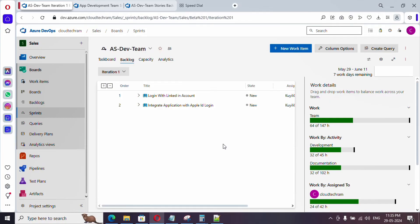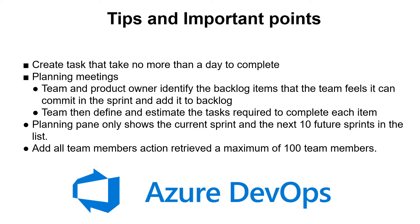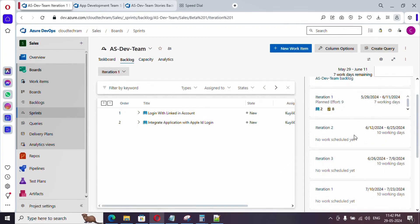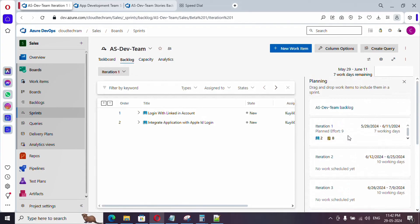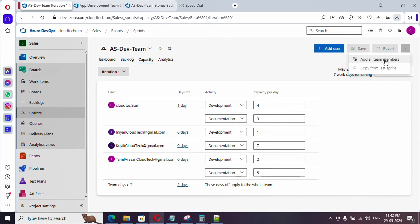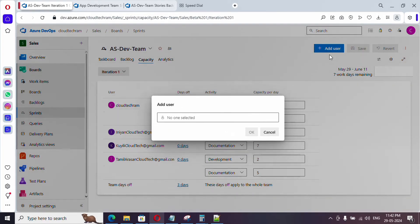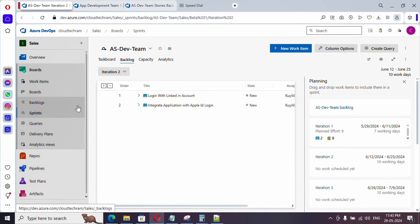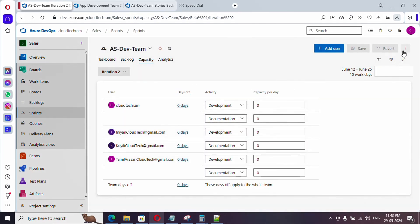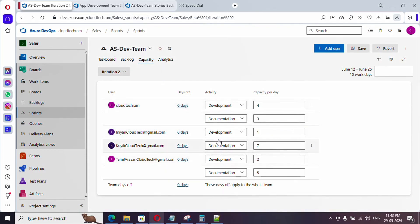Now let's cover tips and important points. You should create tasks so that each can be completed in a day; if it takes more than one day, split the work into more tasks. The planning meeting has two parts: in the first half the product backlog owner identifies items the team can complete based on previous experience, and in the second part the team determines estimates and defines tasks. The planning panel shows only the current sprint and next 10 sprints. Add All Team Members retrieves only up to 100 members; beyond that you must add individually. For a new sprint, capacity resets — use Copy from Last Sprint to carry over settings.